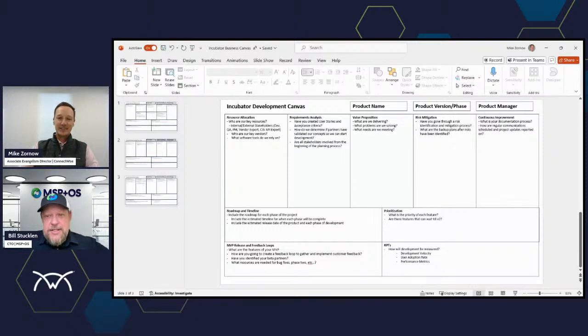So I think the one thing that I have certainly seen mistakes happen on these releases is that the support teams are not trained when the MVP gets released. So what happens is that the channel manager or maybe the product owner ends up taking support calls because nobody else is up to speed on how it's supposed to work. And you certainly don't want your developers taking support calls. We know that just won't turn out well, right? So I think it's important to have that prepared. Here's how it is. Do some training internally for your support team. Even if they can't solve it, they can have the conversation and collect the info you need to do the bug fix. So that's one of the things that I certainly see people making mistakes on.